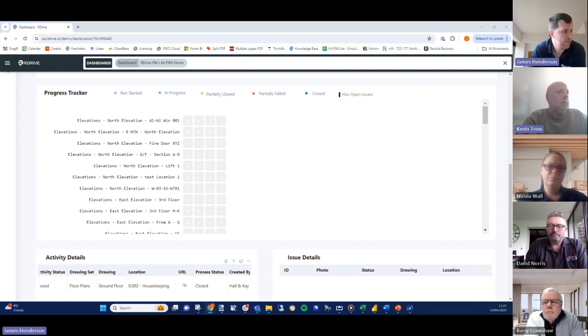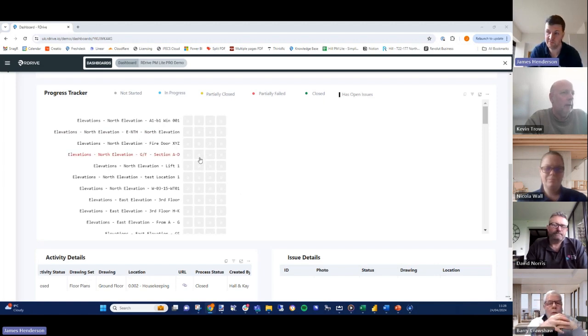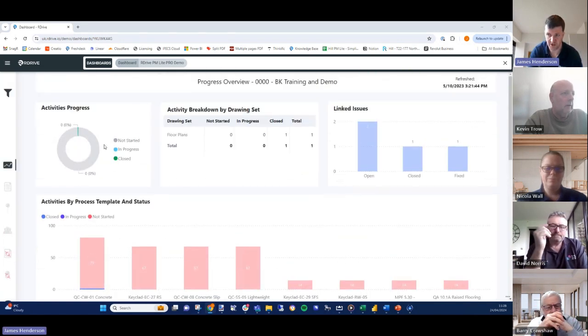Yep. Yeah, I think that's probably easier to do, because it's nearly live, I guess, isn't it? Yeah, it's overnight. We pull this in overnight and then it'll all update ready for tomorrow's progress meeting, showing what we've done. You can use this for all sorts. We all know how much you plan to do. It might be 10,000 forms, might be 1,000 forms, but we'll be monitoring the progress complete.